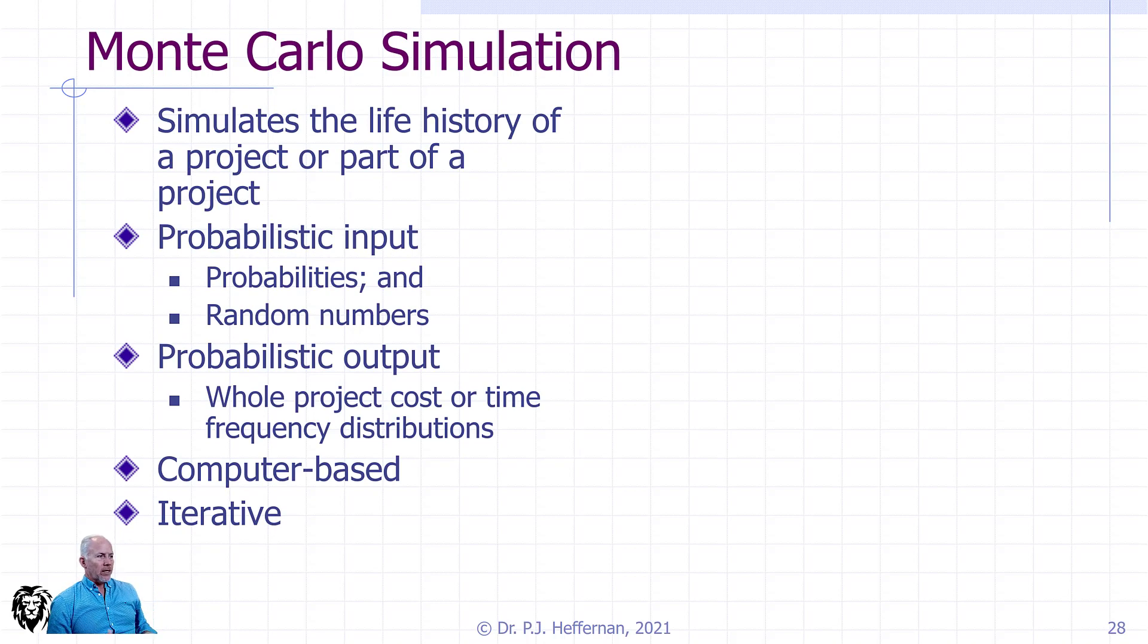So how does Monte Carlo simulation work? It basically simulates the life history of the project or a part of a project. Our input is probability input—what is the probability that something is going to be late? Then we have a random number generator which is going to decide where we are in that probability curve. The probabilistic output is the whole project cost or time frequency distribution. We're going to be able to aggregate this by basically brute force going through this calculation and doing it thousands of times. Obviously, this is a computer model to go through it and build up a single probability distribution for the overall project time.